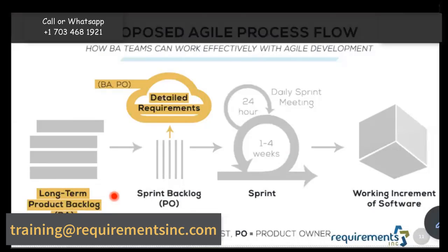That's great. How did we do that? How did we pull that off, right? So identifying best practices and eliminating inefficiencies is all about that sprint retrospective meeting. And the demo to the customer that we spoke about, that's called sprint review. And one item that is not shown in this chart directly because the timeline, it can happen anytime during this 2 week period, and that is called grooming meeting.